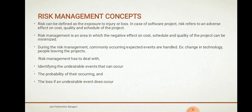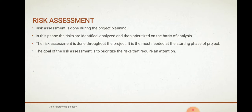There are various phases for identifying risk. The first one is risk assessment, which is done during project planning. In risk assessment, we identify the risk, analyze it, and then prioritize it based on the analysis. These three phases are done throughout the project because they are needed starting from the initial phase. The goal of risk assessment is to prioritize the risks that require attention — that is, ranking the risks.